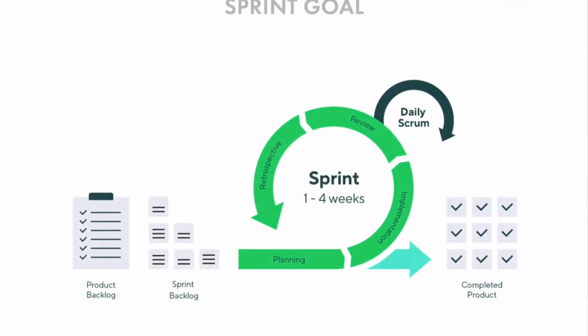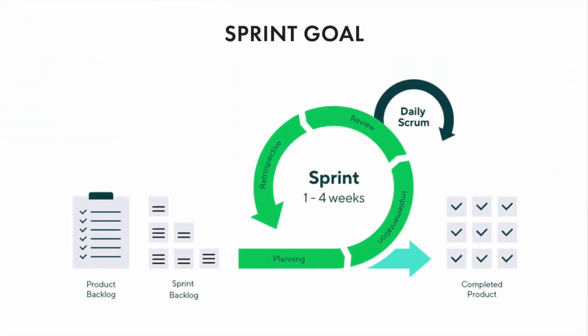So a company is doing a sprint, and the sprint goal is to improve customer retention by, let's say, 20% by implementing a feedback system. And notice how it doesn't vaguely say that it just wants to improve customer retention. This example wants to improve it by 20% and has an exact figure in mind.